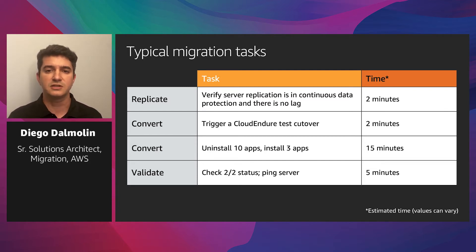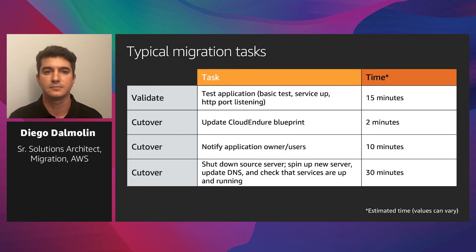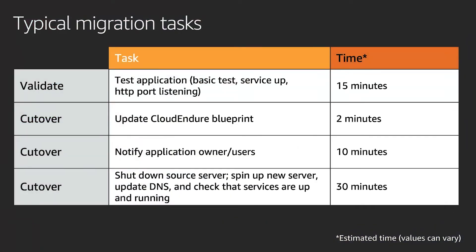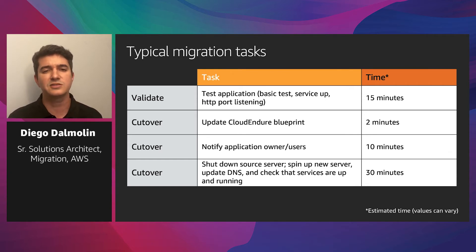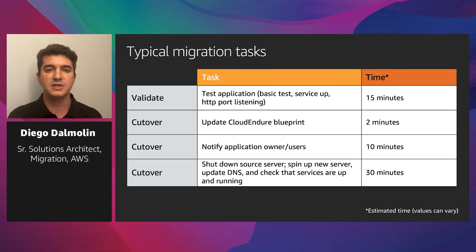You have to check if the converted servers are booting up and returning a status of 2/2 in the Amazon EC2 screen. Test if the migrated application is working as expected, if the application is up and running, and if it can be accessed by test users. You have to update the CloudEndure blueprint configuration again to change settings from test environment to production. Notify users about the maintenance window, and as final steps, shut down source servers, cut over the migration, update DNS records, and check if everything is working.